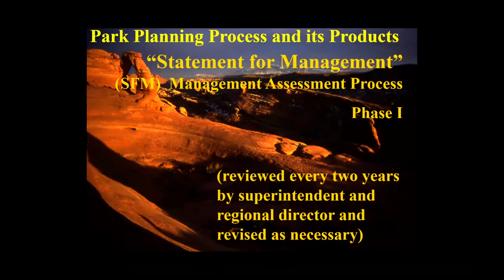Okay, if we're imagining a brand new national park or monument or recreation area, they begin with what's called phase one, a statement for management. So it's not nearly the document that there will eventually be, the general management plan, but boy, when a president sets aside an area, they need to get managing it pretty darn quickly. So they're putting together first this smaller document, though it's going to look huge to you. These are supposed to be replaced within 3 years. Occasionally there are exceptions in getting the general management plan written.